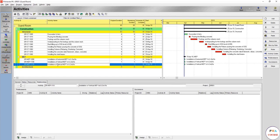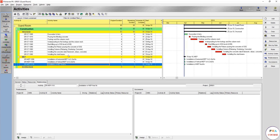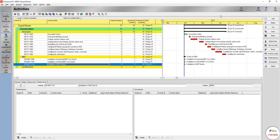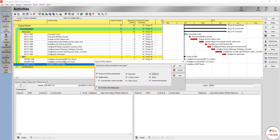But here there's something that's kind of missing. It's only one room, or if it's a basement in a large building, usually there would be some MEP containments inside the slab on grade. You're going to do it either before the repairs or you're going to do it with the repairs. In such case, we will assume that there is, and you're going to add the activity.